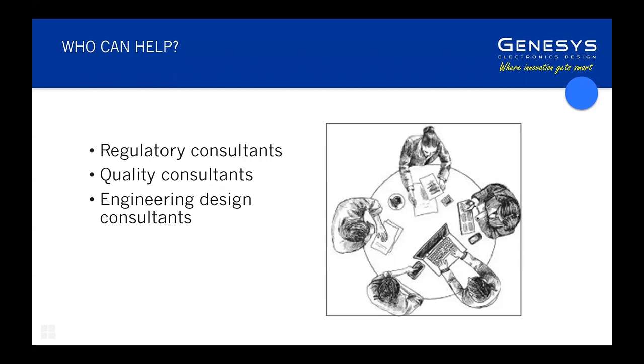And on the planning side, at the start of the project, in many cases people ignore the risk coming from the suppliers, from the service providers, the resources required, and one of the main things which is sometimes missed or not well addressed is the compliance to regulatory requirements, especially when the device team is trying to find the best class for the device. So there's a lot of risks there as well, which must be addressed at the start.